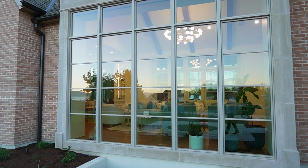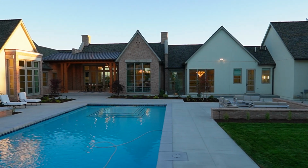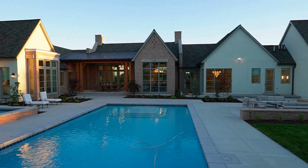Joel, you know this house a lot better than I do, and you know the work that's taken place to not just build it, but to plan it. Go for it. Planning is essential to have a successful schedule, a successful build, be able to keep your clients on budget. You know, the really good subcontractors are not just readily available. They have to know oftentimes years in advance, or at least 12 months in advance in most cases.